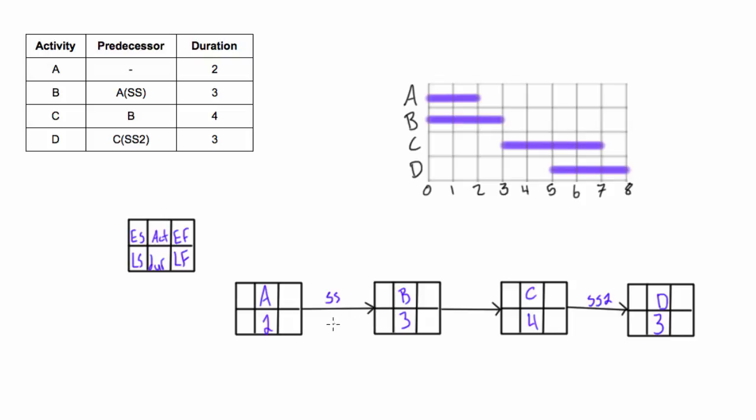Alright, so now let's do our early start, early finish on the forward pass. We're starting at the very beginning of the project, so it's 0. 0 plus 2 is 2, A ends on 2. Now this is a start-start relationship, so B, the earliest start it can start when A's earliest start is, or it can start when A starts. We'll look here and there's 0 here, so we bring the 0 over and 0 plus 3 is 3.